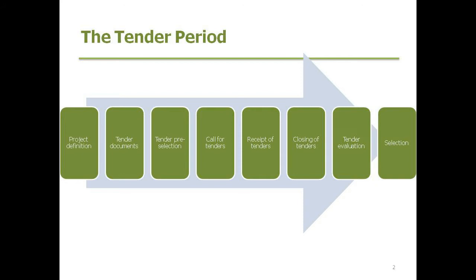Most of those ramifications are cost. It will be also time, but that will come back to, again, cost. Remember, the tender going out is a selling instrument to every builder, contractor and supplier, so that communication must be consistent to all. The method of tendering will vary from the scale of works, say a small project of 80,000 to 300 million, but this simple process from the left to the right of the screen, the detail here, the workflow, is exactly the same, and that's the way it needs to be approached.